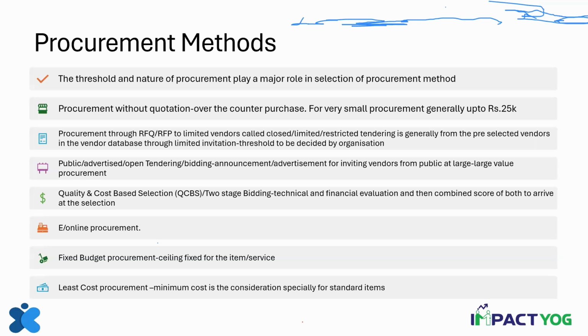So e-procurement and online procurement also ensures that everything is digital. You don't see the vendor. You don't need to see the vendor. Okay, so you create that email box, and in the terms of the public tendering that you will do, say that please send your procurement queries to this mail ID, and your bidding documents to this particular mailbox.